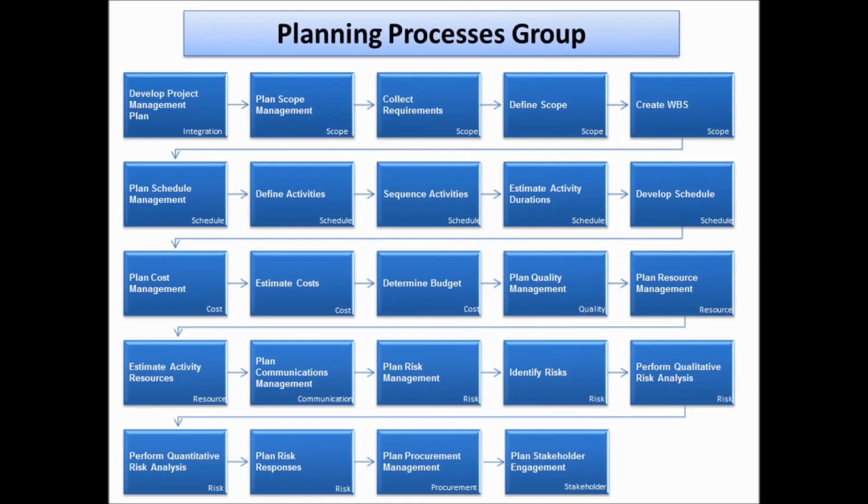In the initiating process group, we had identified stakeholders. Remember that? Now we need to understand what I need to do with the stakeholder based on the influence and power by grouping them. For example, we have a senior leader who is also the project sponsor who falls under the high influence and high power and needs a special type of communication. Get the point here? This is what we do here in plan stakeholder engagement. How well I need to engage those stakeholders to make sure of the best outcome of the project.